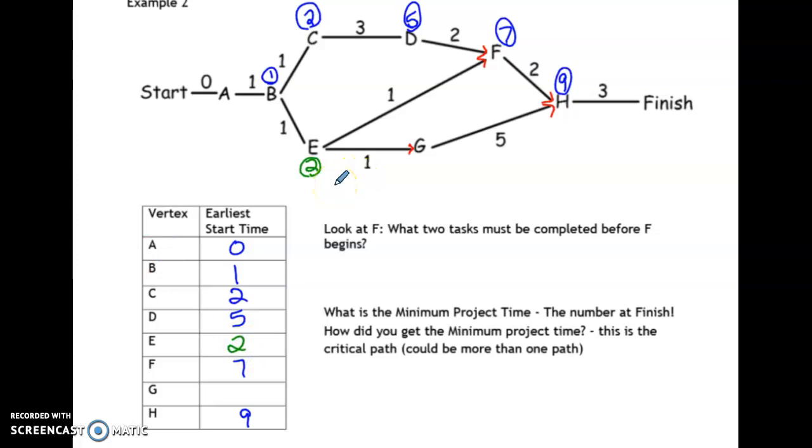Okay, E, taking photos of teachers, is just going to take a day. So let's go down here and then we'll check up there as well. So we're up to 3 days. Before I ever start G, which was designing a layout, I needed to spend some time getting my film, taking pictures. Okay, now that I have my pictures, I can design my layout. That'll take about 5 days to design that. So I'm up to 8 days so far. So this path took 8 days.